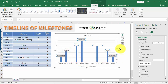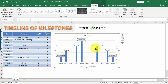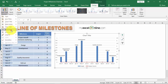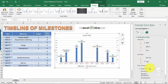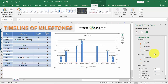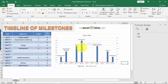Now let's change the columns into thin lines using error bars. Click anywhere on the chart, go to Design, Add Chart Element, then select Error Bars and More Error Bar Options. We want the error bars based on Height. In the Format Error Bars pane, set the Direction to Minus, End Style to Cap, and Error Amount to 100%. The error bar now extends all the way through the column.